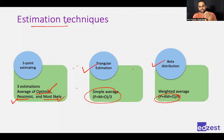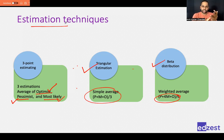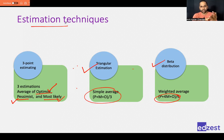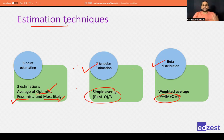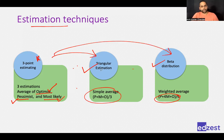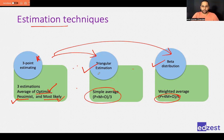Remember for the exam: if you have historical information and like-to-like comparison, use analogous. If you have historical information but not like-to-like, with some parameter and mathematical equation, use parametric. When you don't have historical information and are relying on team experience, use three-point estimating — either triangular or beta. When the question asks which technique gives the most accurate estimate, go for bottom-up.